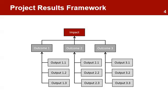This level is important: each outcome must have all the required outputs. The project will not be able to achieve the outcome objective if one of the outputs is not delivered. For example, to fully achieve outcome 3, all three outputs must be delivered.